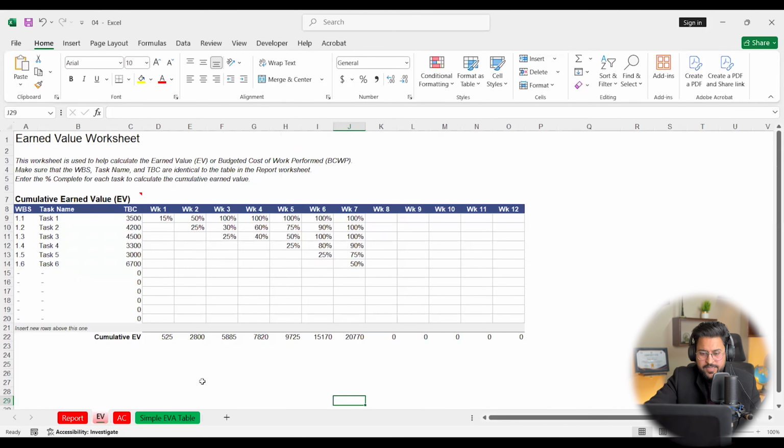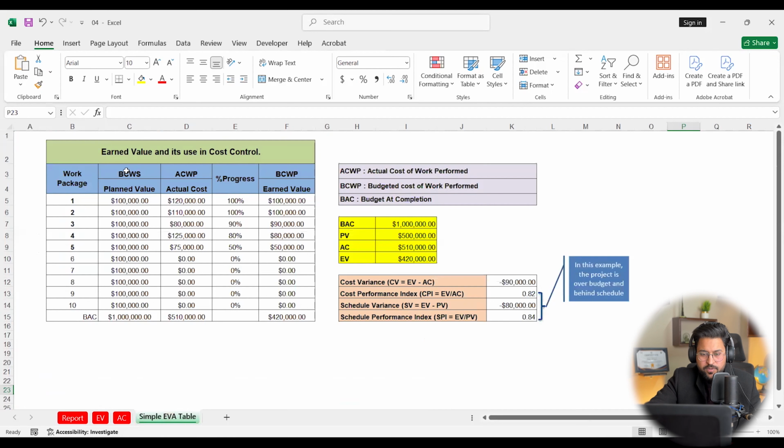And as far as earned value management specific reporting is concerned, earned value management is going to deal with the specific values of planned value, actual cost, and earned value. Planned value actually belongs to the planning phase, right? Actual cost is the actual cost that has been incurred to do that work. Earned value is actually the schedule percent complete, how much work you have done, right? These are the three important parameters used to calculate cost variance, cost performance index, schedule variance, and schedule performance index.